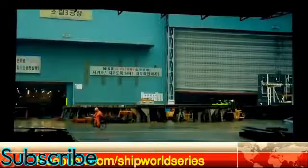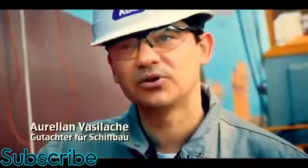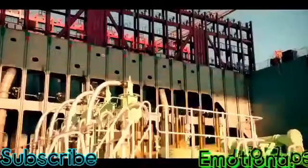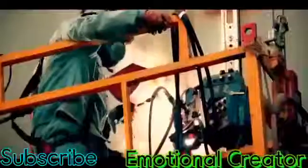But the weather is against them. So today, as you can see, we have a heavy rain. We want the welding joint to be clean and dry during the welding. So everybody should stop welding outside in unprotected areas. We just have to wait until it stops. After 3 days of heavy rain, the sky's clear, finally giving the yard the chance to catch up.